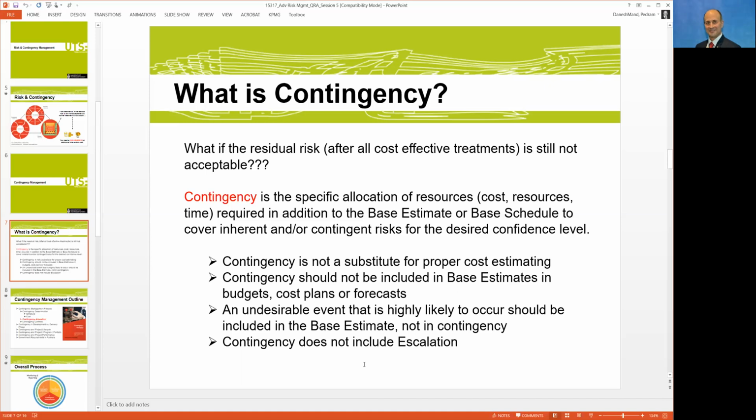And I said, look guys, it's okay, but the problem is you already have a very heavily overestimated cost, because you're putting contingencies in different places. And then on top of it, at the end of the process, you're adding another contingency for the whole thing. And that's not a good practice. In other words, it's not the optimum price.